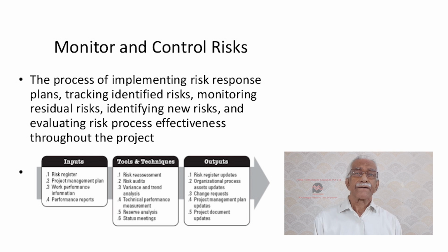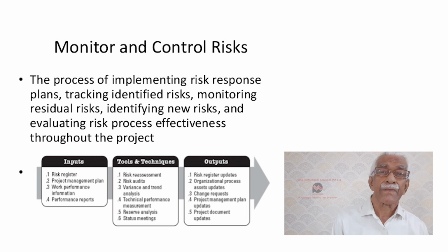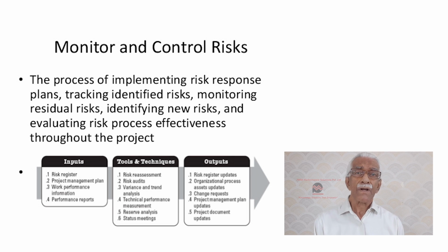Fourth one is look out for the watch list of non-critical risks which was created earlier. Some of the risks in that watch list might have become critical, so prepare response plans and be ready.